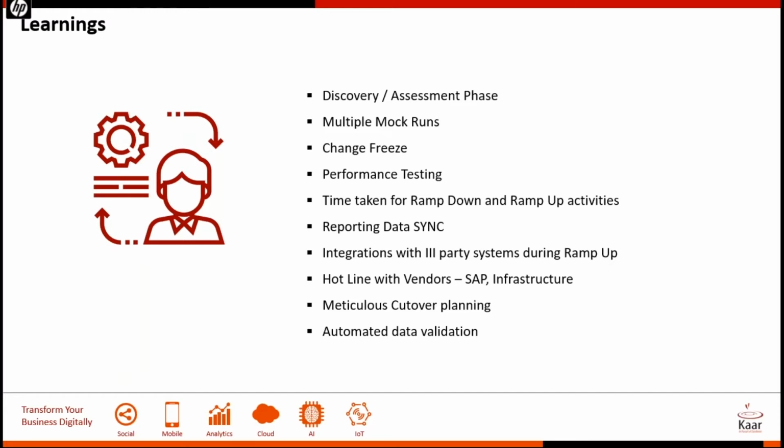Like I said earlier, do the discovery and assessment phase well ahead of time, possibly 3 months before you really start your project. Get all the information, get enabled, know what you're getting into, and there are certain tasks from the pre-checks that you run ahead of time. So this is a complete business case, a project L1 project plan, the commercials that would be involved. You can order your hardware and get all of it ready in case you're doing on-premise.